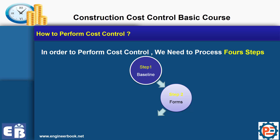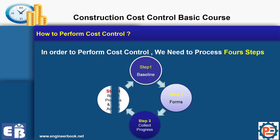So step one is preparing the baseline. Step two is preparing the forms where you are going to collect the information. Then you put all this information together in other forms — we call this step collecting progress. Then you need to report your progress and may take some action which can impact the baseline. Project management is an iterative process. You need to always revise your baseline and provide more accurate information. Thanks to Microsoft Excel, it makes our life much easier, and we will discuss all four steps in this course.